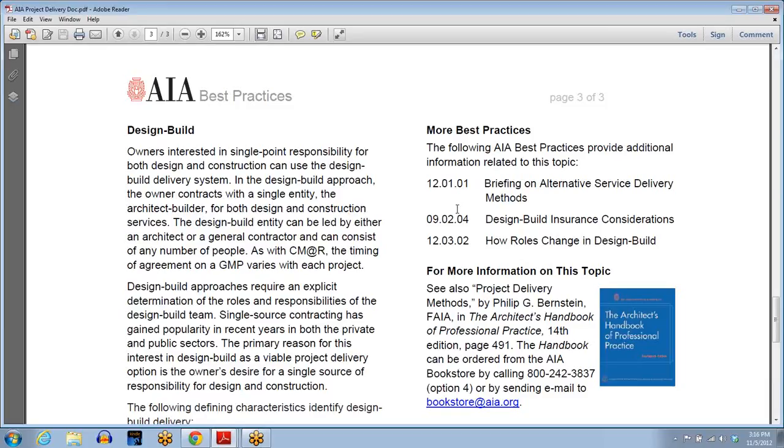And they are all, their contracts are held by the general contractor, and you're paying the general contractor, who turns around and pays the subcontractors. That's traditional, where the architect designs it. He's under a separate contract. You bid it out to qualified general contractors, builders, pick one, and they build it.